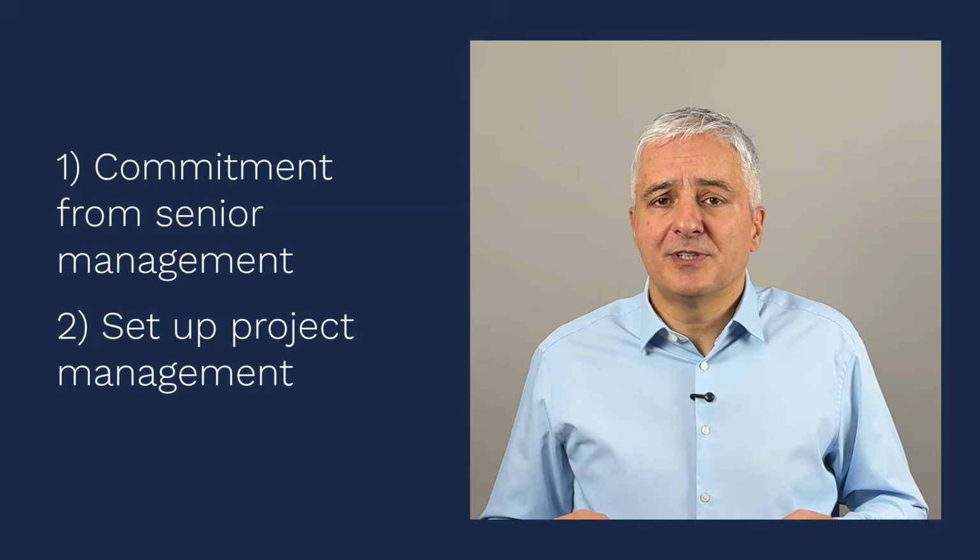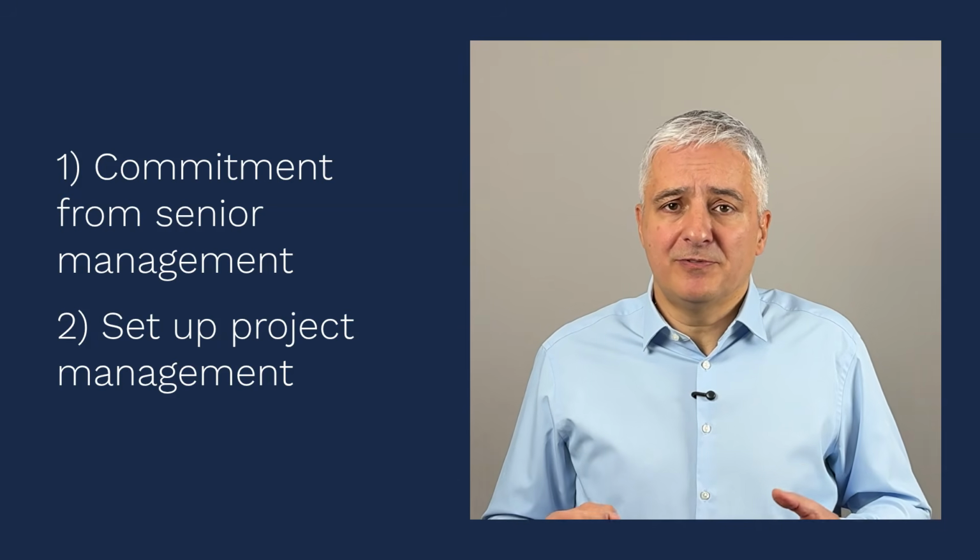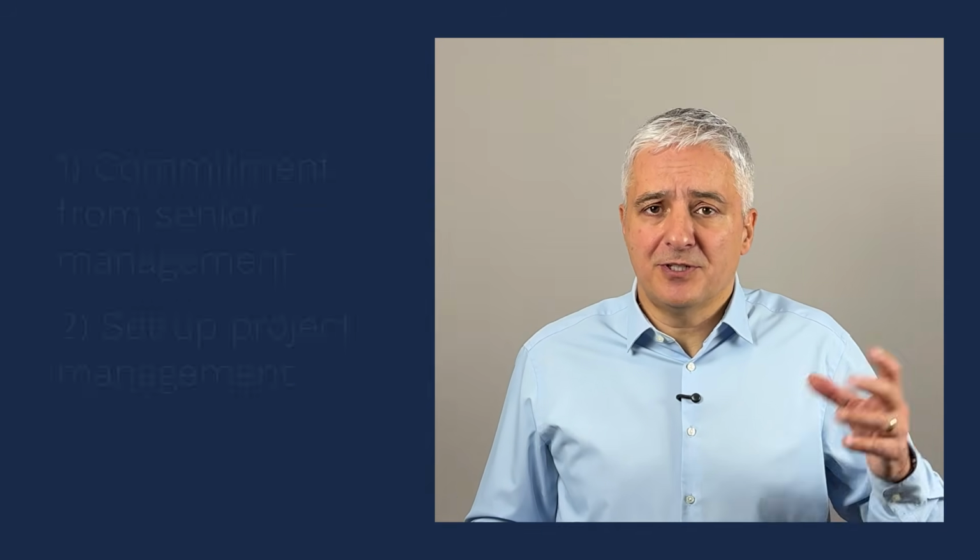The next step is that you set up project management, so that you define exactly who is running the project, the project manager, and who the members of the project team are. And by the way, you should typically have a project team if you are a mid-size or larger company. For a smaller company, maybe this is not needed. You should also have a sponsor of the project, someone from the senior management who is not actively participating in the project, but whenever a project gets stuck, the project manager can turn to this project sponsor to unstick it. You should also have a project plan with some clear milestones and so on.